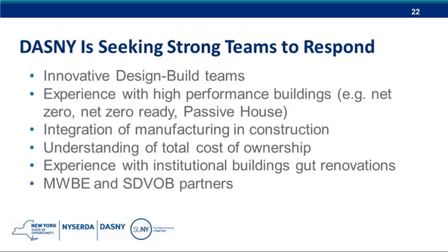The other thing about that is, again, we're working with DASNY because DASNY has design build authority to do this for SUNY. We don't have that for our other types of projects, but right now through DASNY we can do design build, and that does allow smaller teams to partner with others and end up being a part of this overall solution.